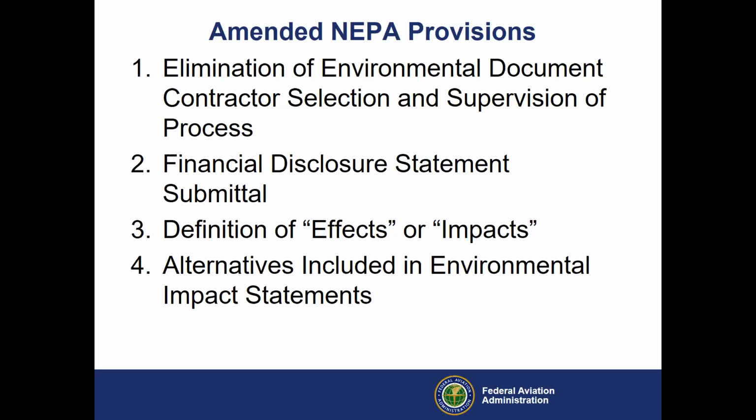However, after the selection process, the EIS must be prepared under the supervision of the agency, the lead federal agency being the FAA. Another change in the amended regulations is that environmental assessments prepared by applicants and contractors must be prepared under the supervision of the agency as well. Again, that's us. Unfortunately, I guess that was never in writing before.